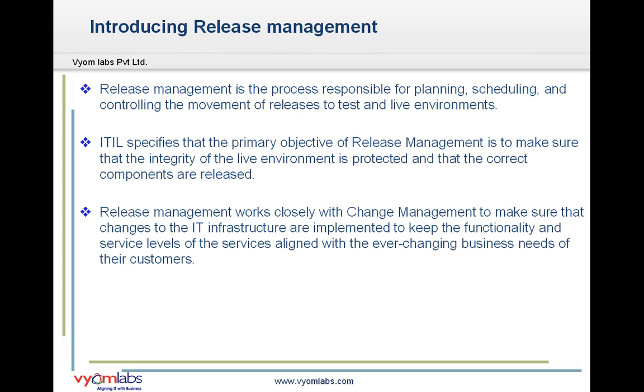Now, coming to the last release type, that is backlog, which provides us a method to identify and review multiple changes, incidents and problems that are candidates to target for implementation in a release. This release type is a grouping mechanism that our change advisory board uses as candidates to review for future releases.